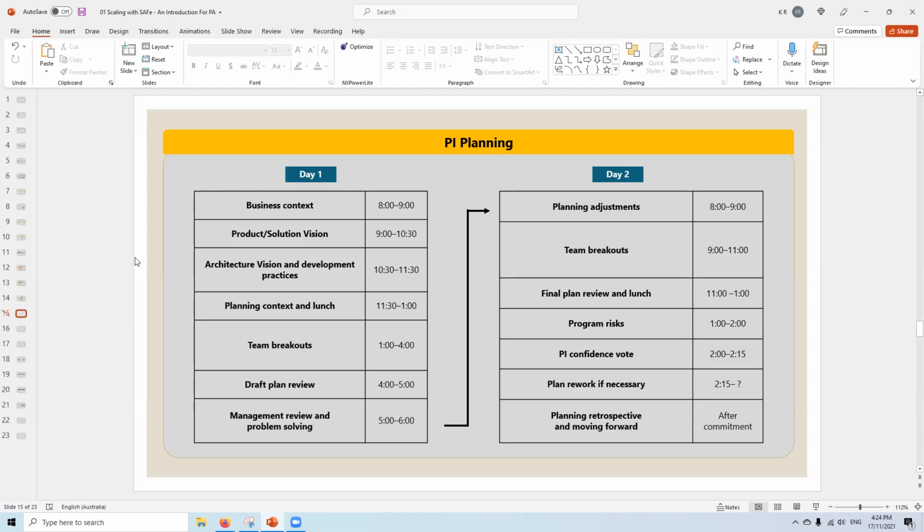If you have a problem or require any help with the integration testing, there is a system team that can come and help both the teams. There is a catch. The system team is not part of all the discussions, all the meetings, all the slicing and dicing of features into smaller stories. So there is a lot of discussion that happens with the system team before they can even start helping you. Whatever your team is responsible for, you test that, and once you have the sending of the data and the receiving of the data, you have a piece. You both together, or representatives from both teams, can sit down and look at it together. So first you start with whatever you're responsible for, and then take the next step. Always take the help from the system team, but there is an overhead that you have to give the knowledge transition to the system team, because they are not privy to all these meetings where the requirements are discussed.